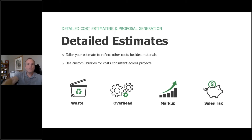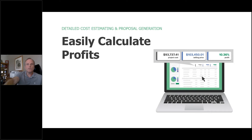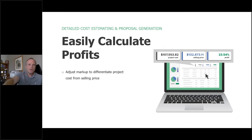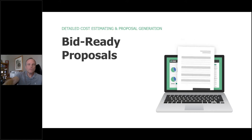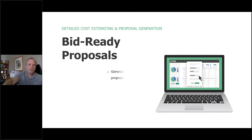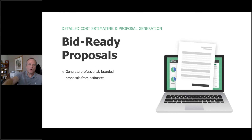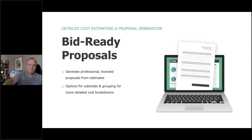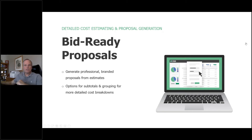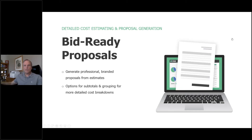Once you've established all this information, you can start to understand what type of profit you're going to have on the project — using markups to differentiate your selling price, and visualizing that percentage of profit, cost, and price. What you can then do is create a bid-ready proposal with your logos, created specifically for your client, with all the right branding, subtotaling, grouping, and detailing. With that, we're going to turn it over to Troy to show you in the product how this operates.